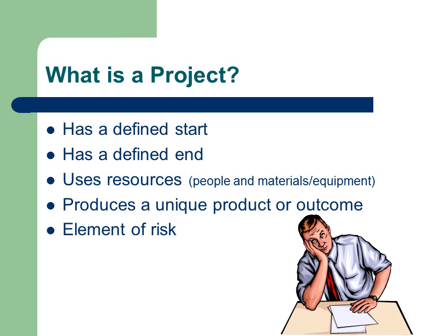Finally, a project is always risky. Some projects, such as those using or creating new technology, will be more risky than one which is using a well-tested approach. For example, the cost of building a project home is more likely to be closer to the original estimate than an architect-designed concept home with unusual features or building methods.